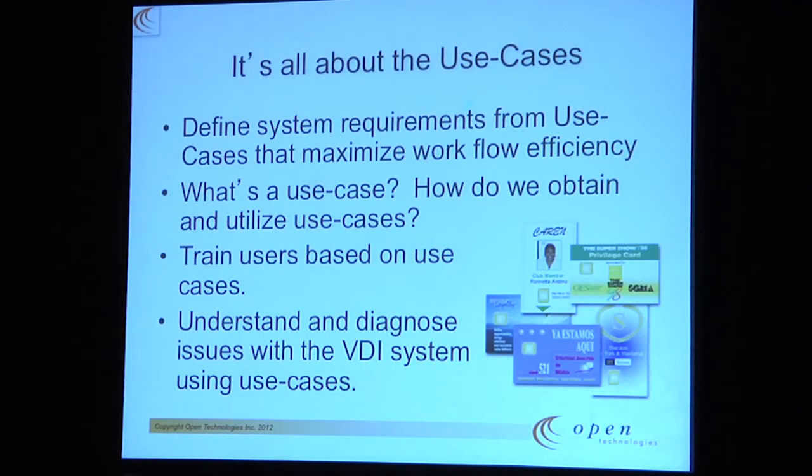If you have defined the use cases, you have defined the behavior of your users and how they use the system, then you define all of the characteristics about the system that you need. So if something ever breaks, I can refer back to the use cases to say, hey, that's a new way you're using it. When we did that POC or that project or that pilot, we said we're only going to do this or this or this. We define how we're going to use it.